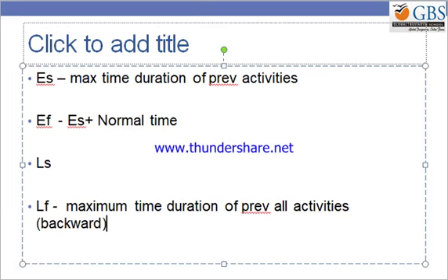So this is how exactly it is going to be calculated. Then what is LS? LS is again LF minus normal time.